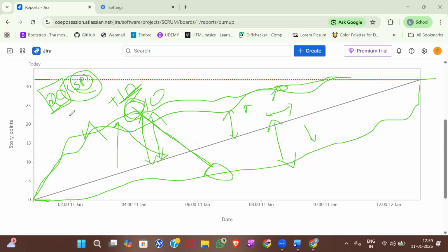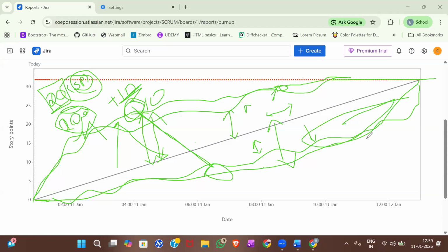And let's say in the same scenario, they thought these same 20 user stories are very easy to complete. They have underestimated the story points. But at the implementation part, while implementing, they feel they're very hard to implement. Then they will be far behind the imaginary line. So that means they haven't selected the exact complexity of the user stories, and now they are facing the issue. Even though they achieved the target at the last moment, there might be lots of issues in between, so that they rushed it so that they could complete that sprint. So both overestimation and underestimation are an issue.